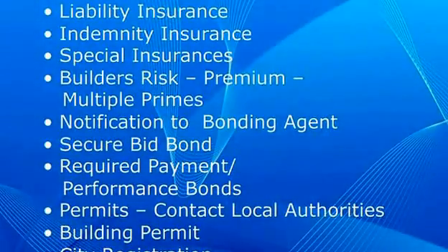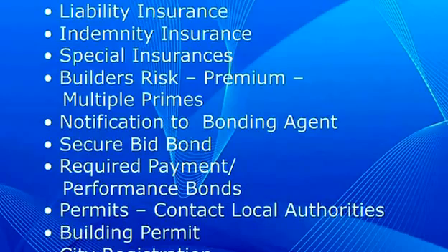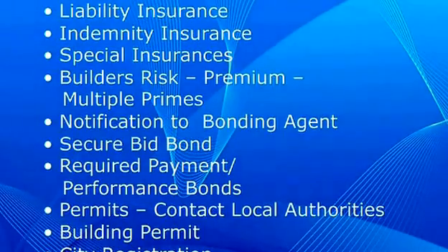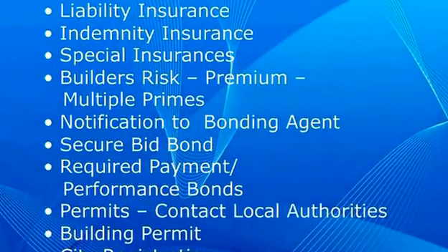So you need to talk to your agent early because you need to get that bid bond. Many entities have different forms that they require. The state's different from Cleveland. Cleveland State is a state, but the state's different, for example, for OSFC, or maybe different from a private client who's using AIA documents, etc. So if you're going to manage your time, you need to get that bond from your bonding agent. They sign it, they mail it to you, they hand deliver it, whatever. You need to get that in time because it is always turned in with the bid.